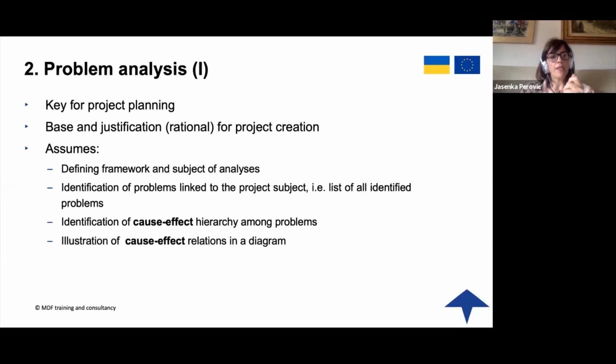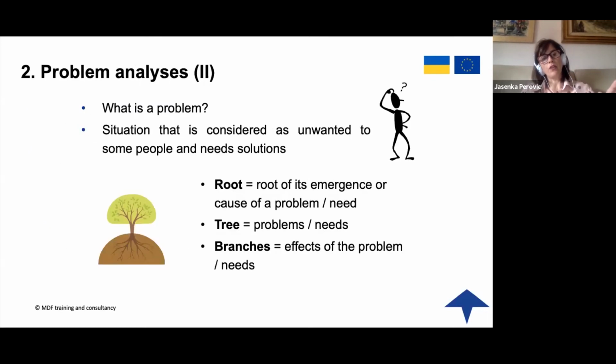The problem analysis assumes defining the framework and subject of the analysis, identification of problems linked to the project subject, and a list of all identified problems. And there is a cause-effect hierarchy among them, and you try to illustrate this in the diagram so you understand. This is again something that you play with.